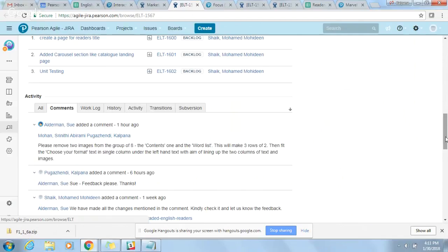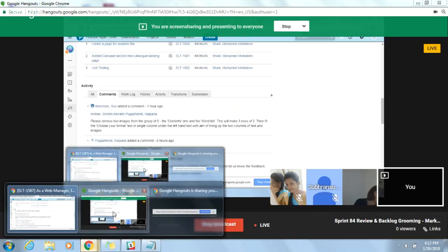Okay, we have to do the testing and then we have to do the production separately. So, well, my suggestion would be that you make the changes that I've put a comment in today, this morning, make those changes in the test site, and that you test the page and you push it up to production, but you don't publish it. And then any last minute changes are made in production. Would that work? One minute, Sue. Okay. I think they will.